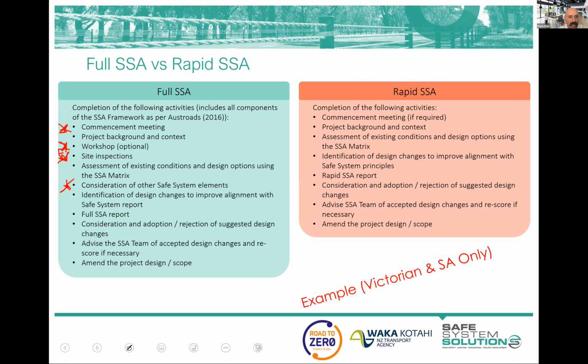You still recommend changes. You do a lighter report for a rapid. It's not a huge amount lighter, but then everything else is the same. It's handed over to the client, they consider it, and there's rescoring if required, and the project's amended. So I would say maybe a rapid is 60 to 70% of the work of a full.